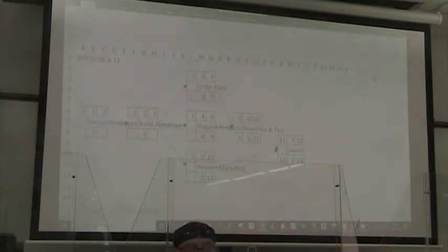So our late start time for order parts is our late finish minus our duration, and for prepare production, again, our late start time is equal to late finish minus, what is that, 8. And here for prepare marketing, equal to our late finish minus